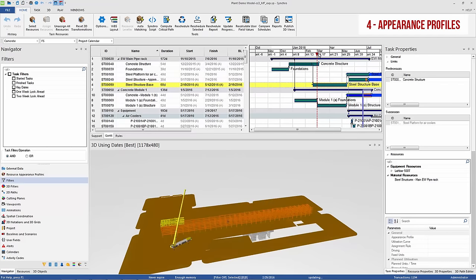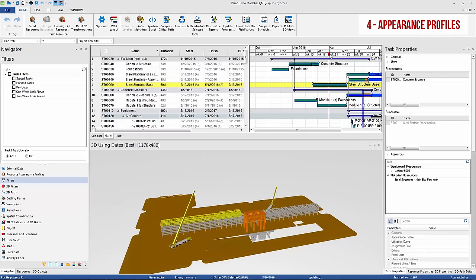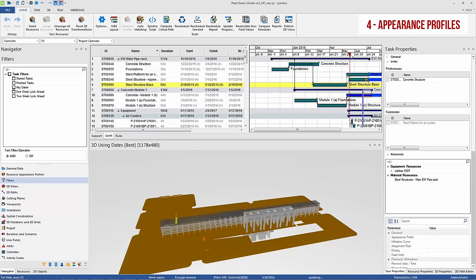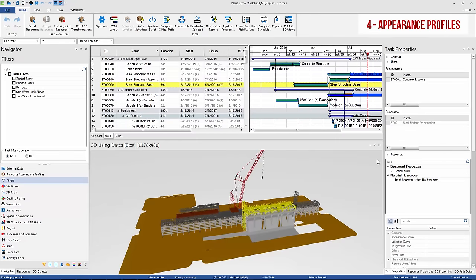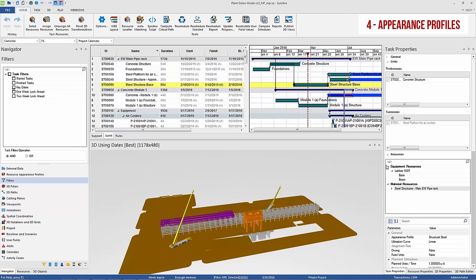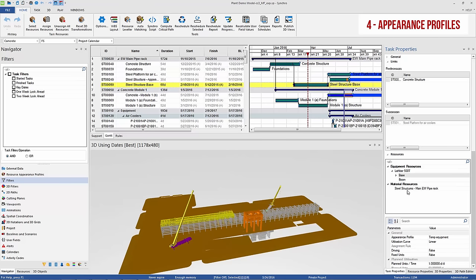Appearance profiles in Synchro allow for growth simulations to indicate the direction of work and better communicate the sequencing between trades. In addition, multiple resources can be assigned to the same activity with different appearance profiles, and this comes in handy when the same activity involves the temporary use of a piece of equipment and the permanent construction of a building element.